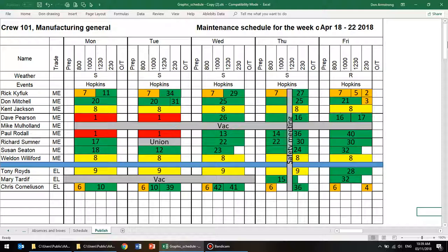Now, a maintenance supervisor's position is one that's subject to interruptions, so I recommend that it's appropriate for somebody else to prepare the draft schedule for the supervisor. A really good position for this is the area planner, because the area planner should be thoroughly familiar with the status and the content of each job. And they should also become familiar with the capabilities of each tradesperson as they work closely with the supervisor. Now, because the planner's position is responsible for looking forward to what's going to happen in the future, he should also be in a position to sit in a quiet office at the same time each week to prepare this draft schedule that does require some concentration.